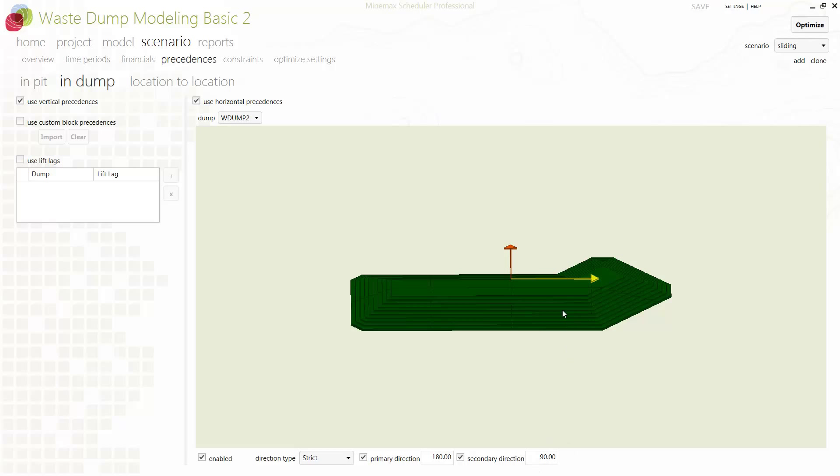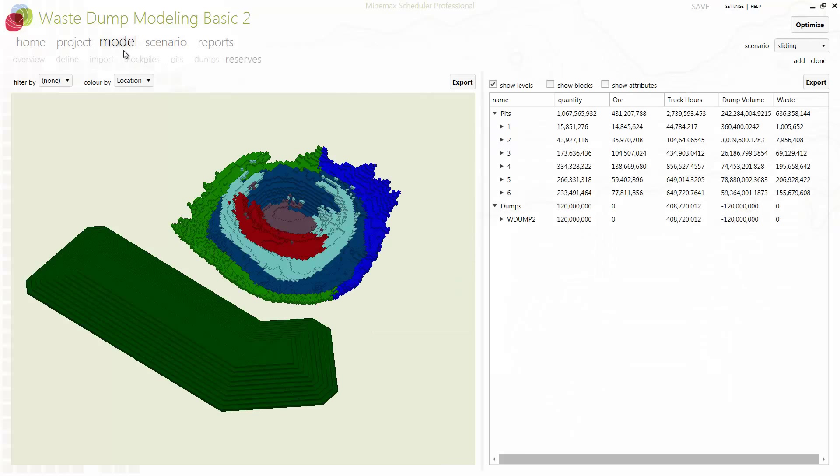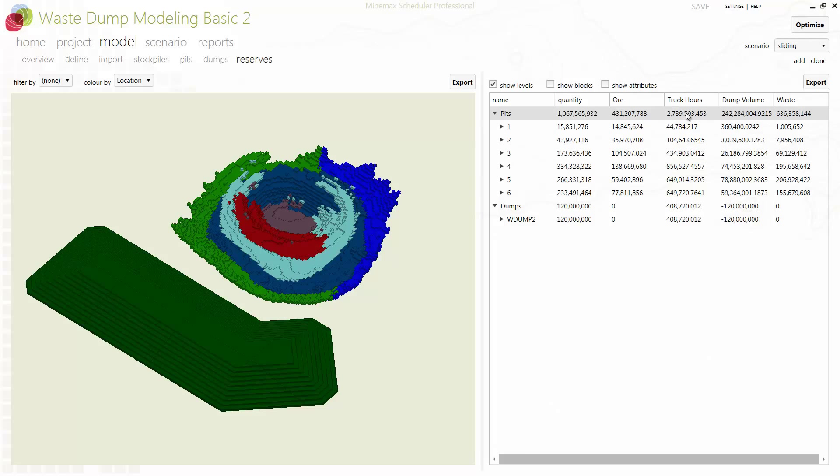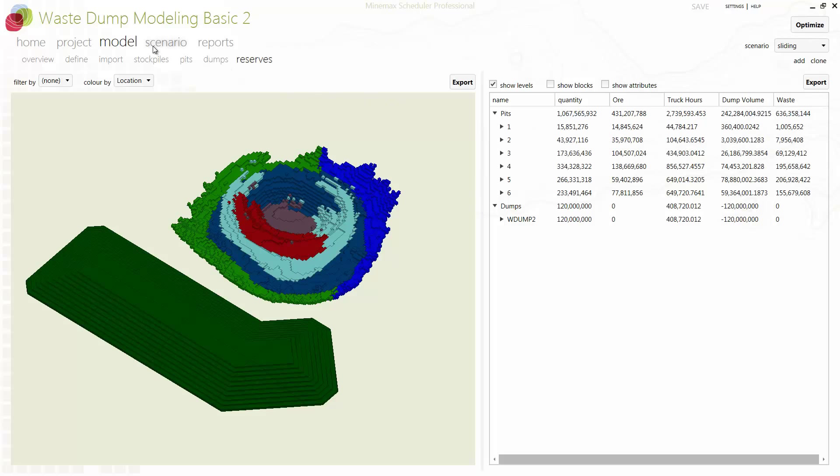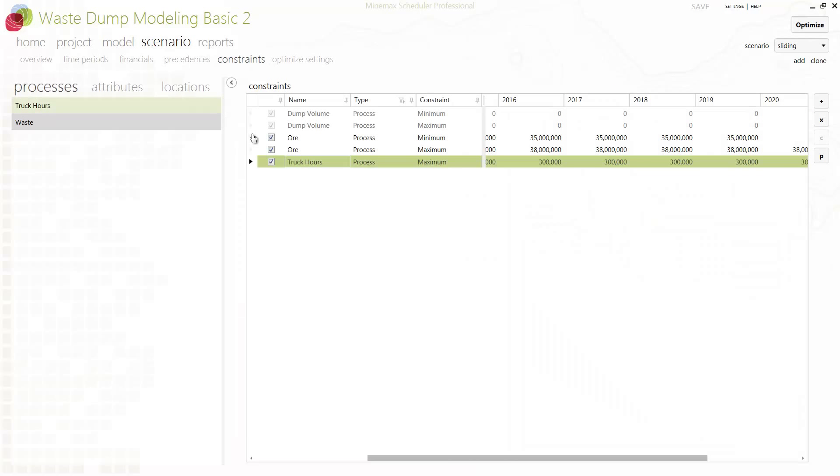A single dump is shown here, but any number of dumps can be used to model long haul and short haul strategies. Cycle times are used to define detailed trucking requirements out of the pit and into individual waste dump cells. Then, in the constraints section, available trucking is defined the same way other capacity constraints are entered.